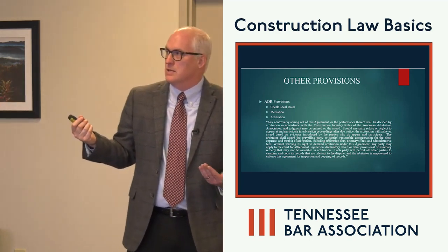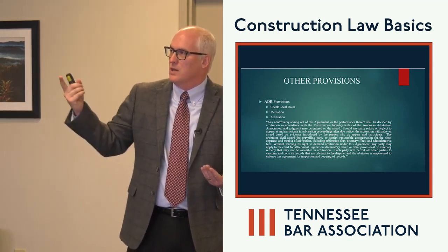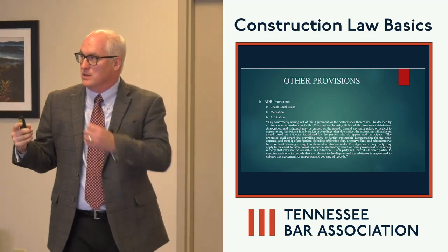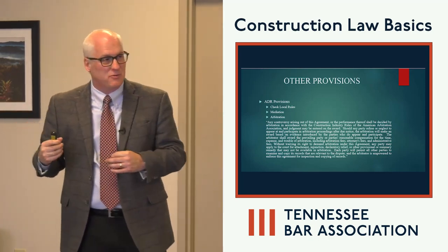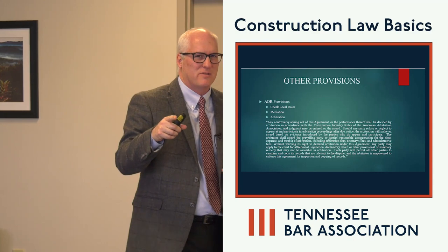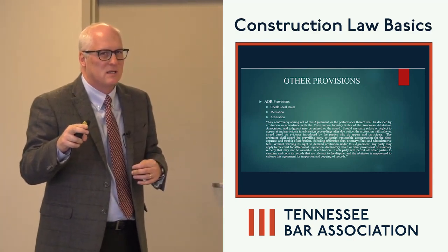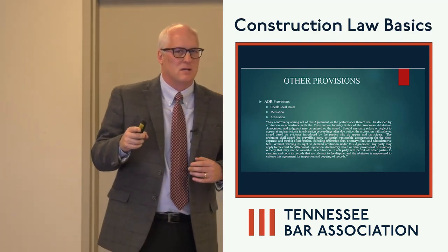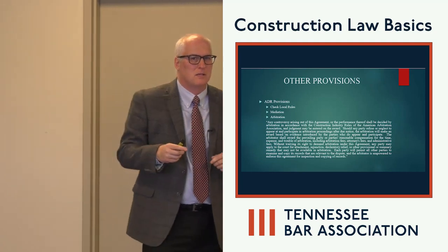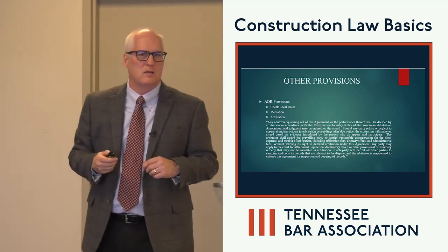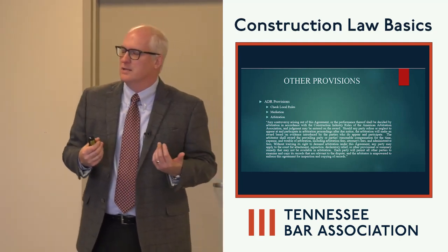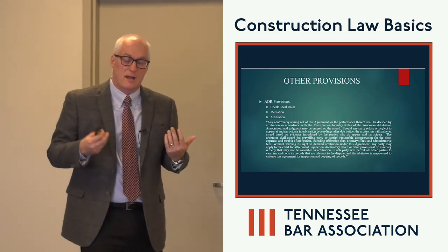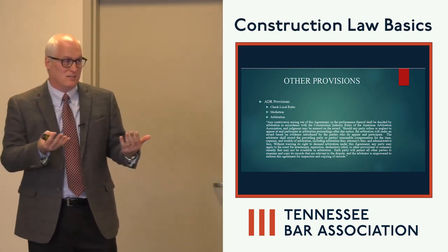And obviously, what I don't like about the ADR provisions, and I got hammered on this, is they've got those fast track procedures. Is it construction? Is it 100,000 and two parties? The AAA rule is not more than a $100,000 claim of either party, not more than two parties. And that goes under the fast track procedure. I'm sure you guys have probably tried these things under the fast track.